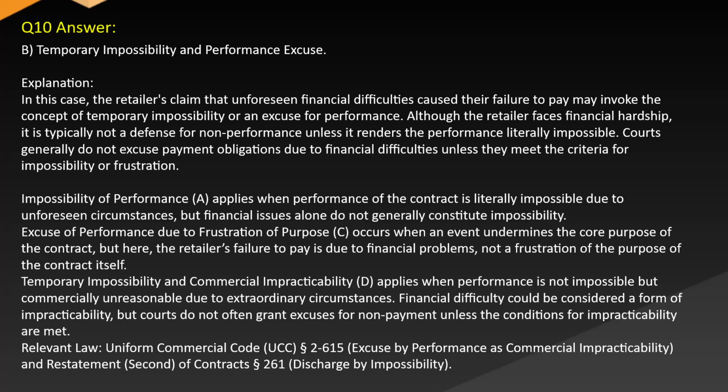Answer. B. Temporary impossibility in performance excuse. Explanation. In this case, the retailer's claim that unforeseen financial difficulties caused their failure to pay may invoke the concept of temporary impossibility or an excuse for performance. Although the retailer faces financial hardship, it is typically not a defense for non-performance unless it renders the performance literally impossible. Courts generally do not excuse payment obligation due to financial difficulties unless they meet the criteria for impossibility or